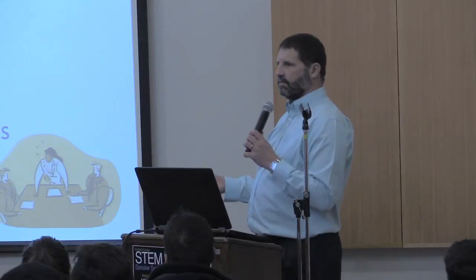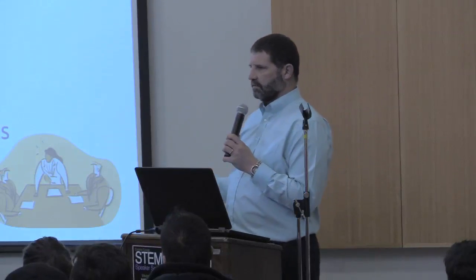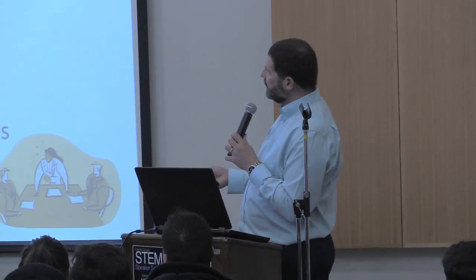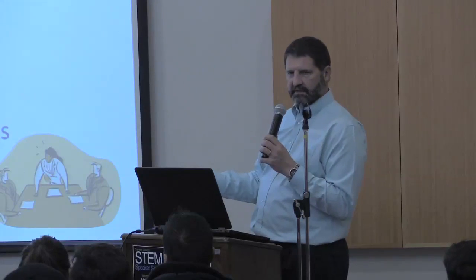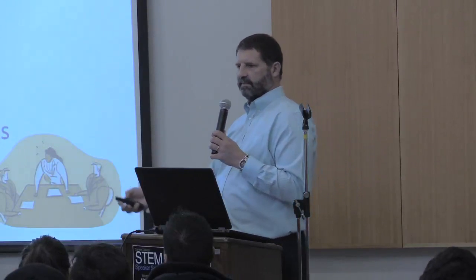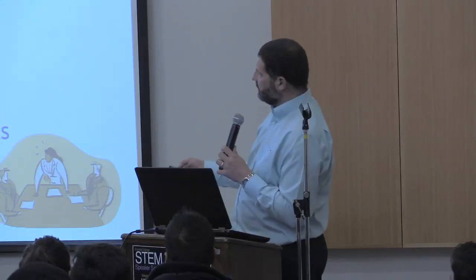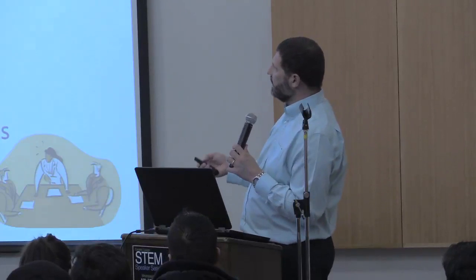And solving problems is what we do. Root cause analysis is going to look at what's the root reason why this was a problem. What can we do to fix it? And you dig down into that with 5 whys. You keep asking why, and why did that happen? Why did that happen? Why did that happen? And you keep going. It usually takes about 5 questions of why before you get to the real reason of why something happened.